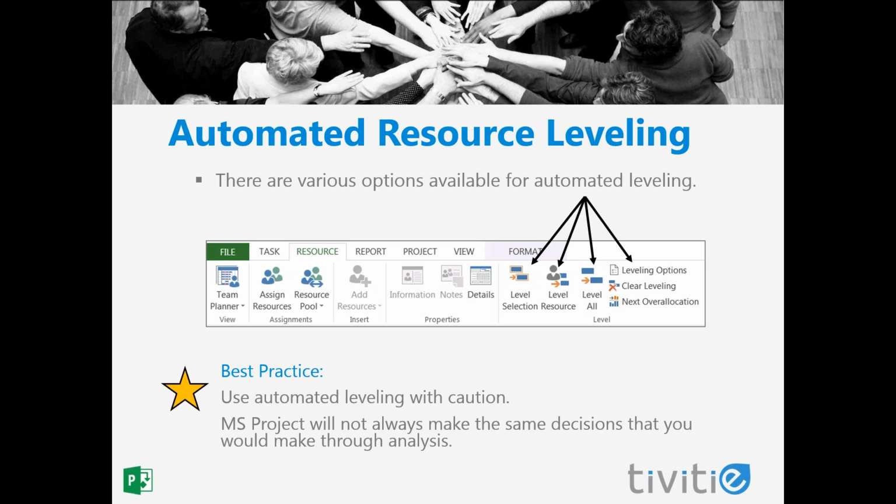Even if the task is on the critical path, Project will push it out. As a project manager, what you would potentially do instead is you would talk to that resource and say, is there any way you could put in an extra hour on Wednesday and try to help us keep on schedule? So just, again, be aware that Project is making some decisions based on the information that you've given that you may not make if you looked at it and tried to resolve some things manually.